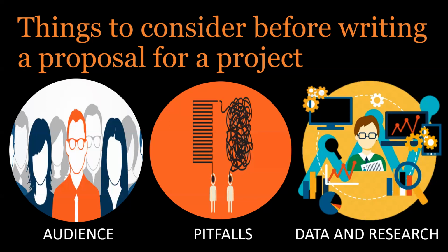Okay. So another one is the pitfalls. You need to consider everything about the potential pitfalls of your project. So a paper from the Project Management Institute Global Congress by Francis McNamara cites four basic reasons why project proposals get rejected. First, they are poorly defined proposals, proposals not aligned with organizational goals. Some proposals' project benefits are not clearly and credibly defined, and some proposals have ineffective project proposal presentation.